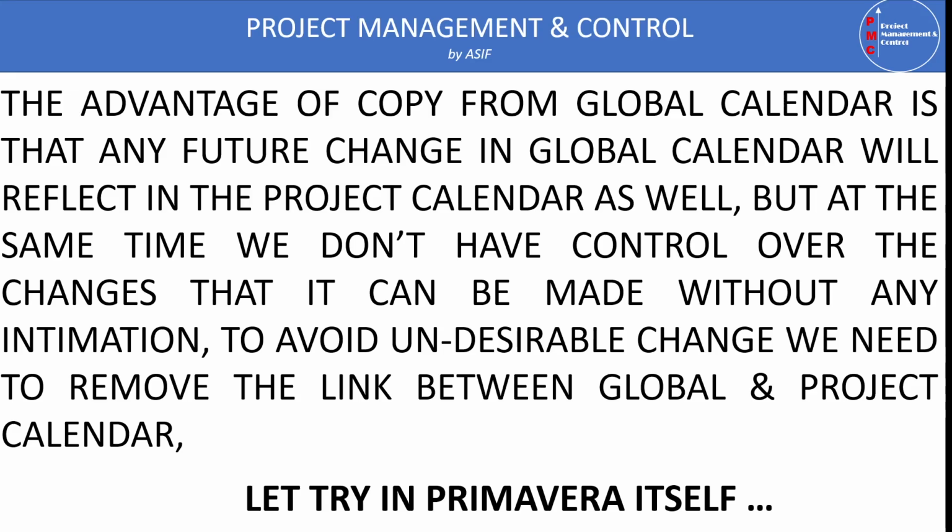The second advantage is that if you make any changes in the global calendar, it will be reflected in all the project calendars linked with that global calendar. So you don't need to go to each individual project and define these changes one by one, because one change will be reflected on all the project calendars linked with that global calendar.